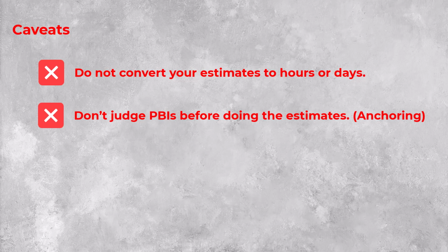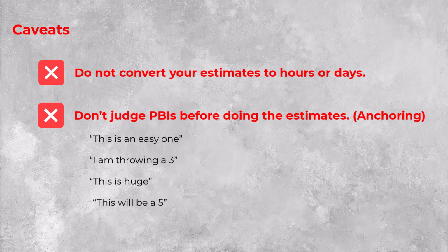It is called anchoring, the effect of causing an estimator to simply agree with a non-estimate before estimates are actually called for. For example, this is an easy one. I am throwing a 3. This is huge. This will be a 5. I have no idea, and so on.